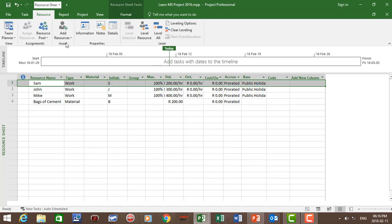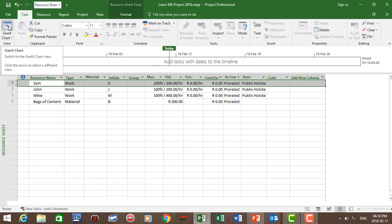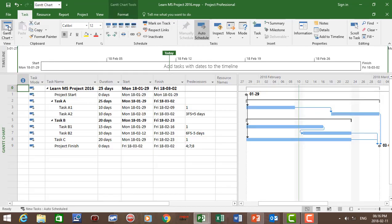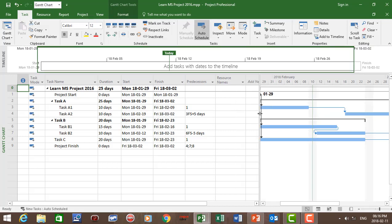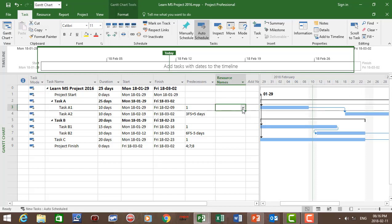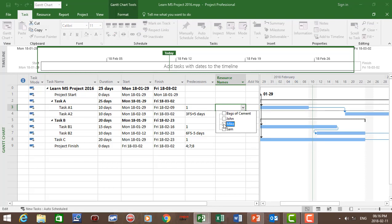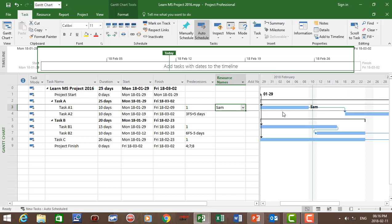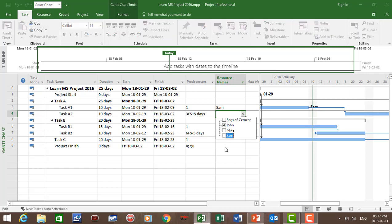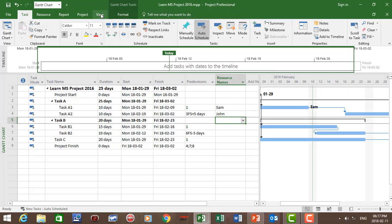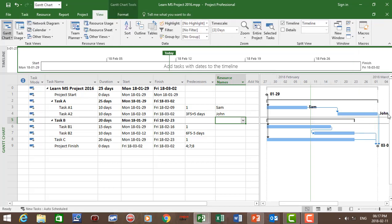Now let's assign our tasks. Go back to the Task tab and click on Gantt Chart. I'm going to show you three options to assign tasks to resources. First, click in the resource column for Task A1 and assign Sam — Sam is now assigned at 100%. If there's no percentage behind the name it is 100%. Then assign John to Task A2 — John is assigned at 100%.